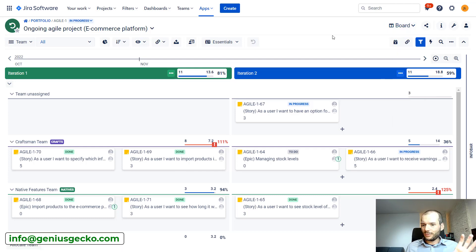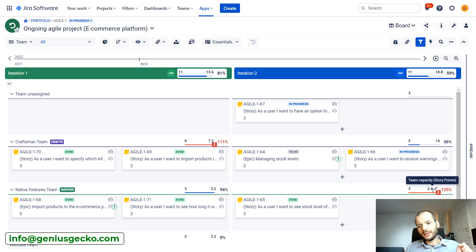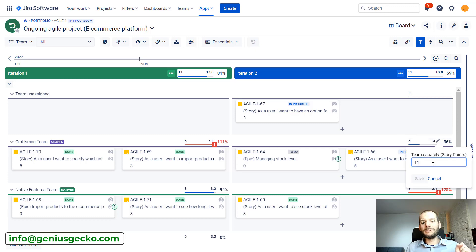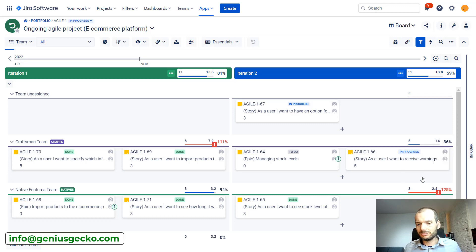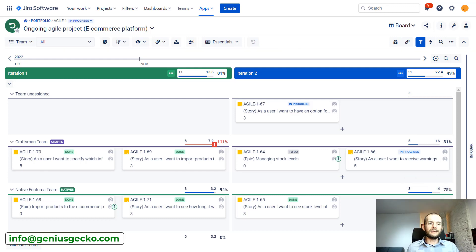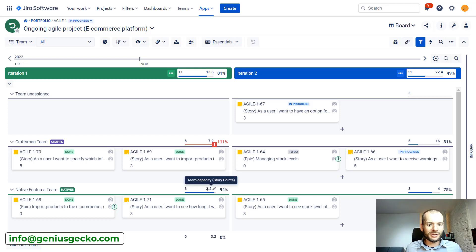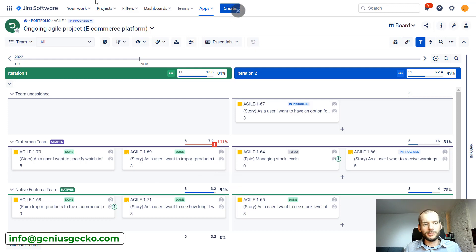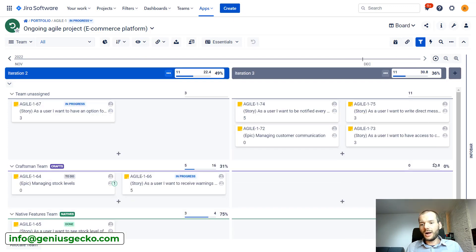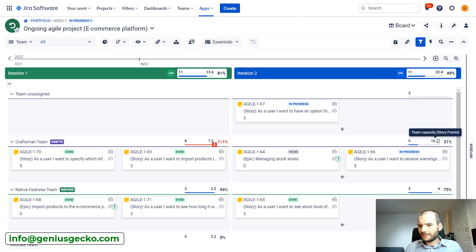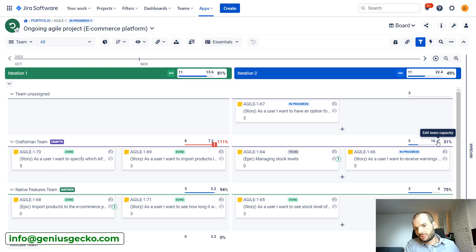What is the best way? You might have noticed that if I hover over here, there is actually an icon. Edit team capacity. I can click over here and simply say that, okay, in this sprint we are able to do 16 story points. This team is able to do 16 story points and this will do four. Because they said that, yeah, last time we delivered three and they had sufficient time to work some more, let's say four story points. So now I updated this value just for one sprint. You will see that here the number is calculated. We can pretty simply edit capacity for each sprint based on what happened in previous sprint.